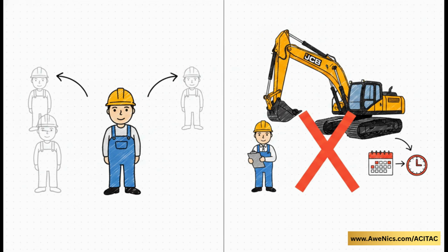And this brings us to a really stark choice. Do we increase maximum units, like hire more helpers, or do we reschedule activities and wait until resources are free? With general laborers, increasing the max units is usually pretty viable. You can often just go out and hire 2 more helpers to hit that 17. But, and this is a massive but, what about the supervisor? You can't just casually recruit and onboard a brand new supervisor for a random 4-day crunch. And there is no way you can just magically summon another heavy JCB excavator on a moment's notice. When you can't just throw more resources at the problem, your absolute only remaining option is to reschedule. You just have to wait until those resources are free.